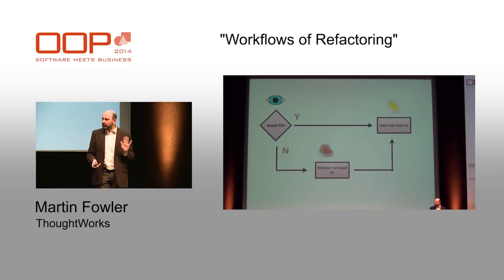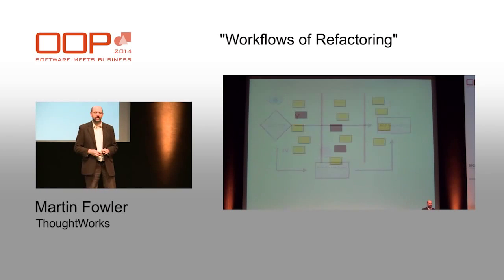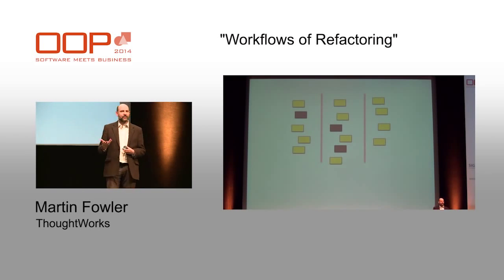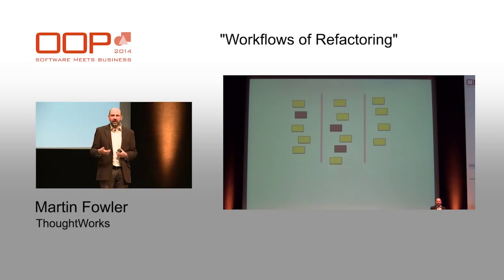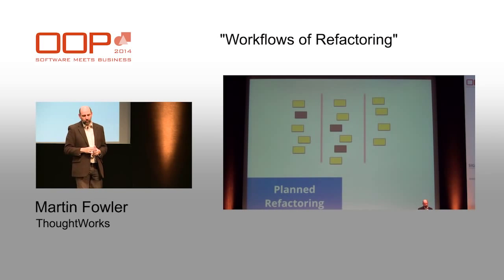The next one is one that is clearly used a lot because I often get questions about it. And that is what to do about refactoring as part of your project plan. This is when a significant amount of cruft is built up in the code base that you actually want to mark it on your project plan as something that needs to be cleaned up. I think of this as a planned refactoring because it's something that's very visible as part of your tasks.